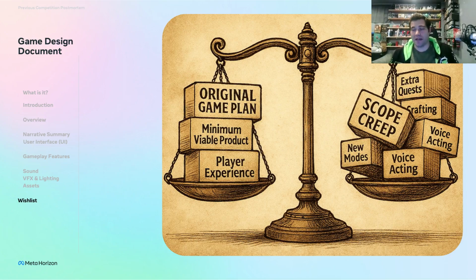And the only reason I say this is because if you keep adding stuff, you end up with what's called scope creep, which can kill a project. And we don't want that. So if you have ideas, great, have them, write them down. Do not forget about them, because we might want to work on them later. And if you have to cut a feature that you've talked about with your team and they're either priority 1 or priority 2, and you have to cut it, don't delete it, move it to the wish list. Never throw out an idea. It doesn't matter if your team likes it or not, just write it down somewhere, that way you have it.